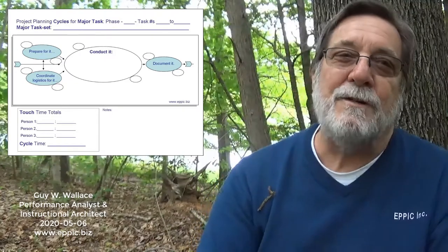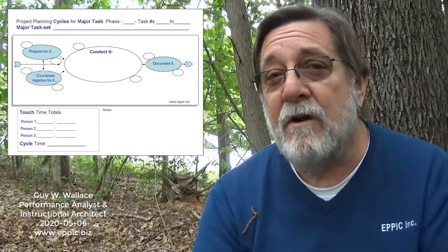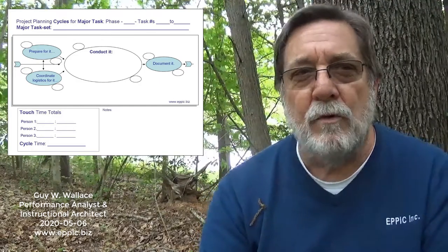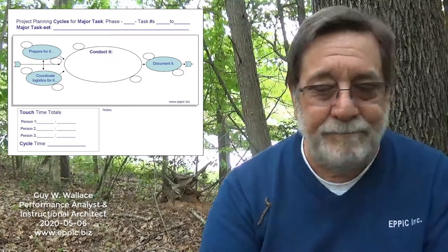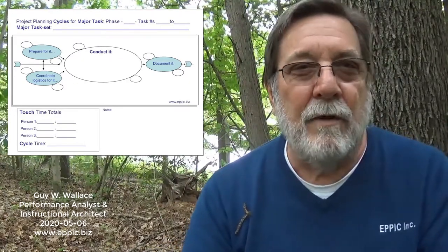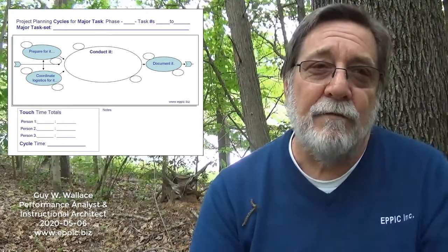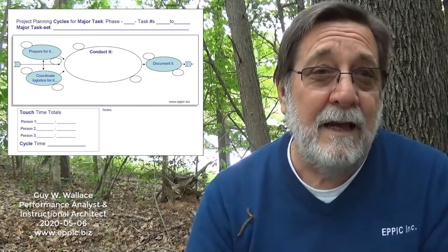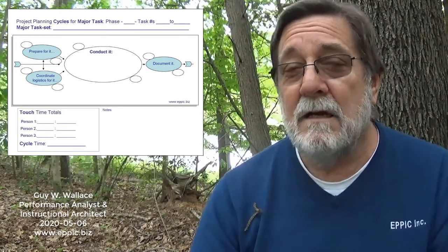And so those are judgment calls that project planners, new project planners especially, struggle with. You know, how much wiggle room do I need to give in here? And some people would put a week in between, when maybe a day would be all that was really needed. But that's part of the learning curve for people who are doing project planning and then managing the projects to their plan.